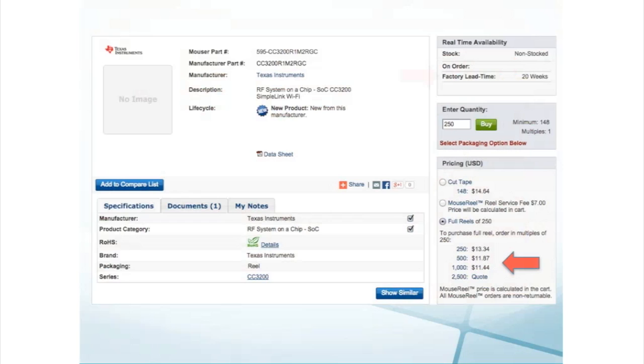But before I go on, I want to make one quick point with the lead time here. This is a topic for another day as well, but I would recommend that you talk to your part suppliers about bonding quantities of these unique parts so that you don't experience delays in production due to supply issues. 20 weeks lead time is pretty expensive.